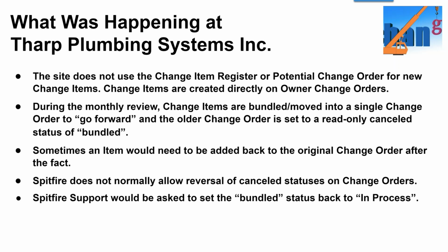All of the work is done on those documents ahead of time, so that some of them are going to happen this month, some of them may not happen for 3 months, others may never be gotten around to, right? But they're doing all of the work from the one document type. There are, of course, the monthly review meetings where, okay, this month we're pulling the trigger on A, B, and C, or more likely A, B, and F, right? So that they pick which ones are going forward.